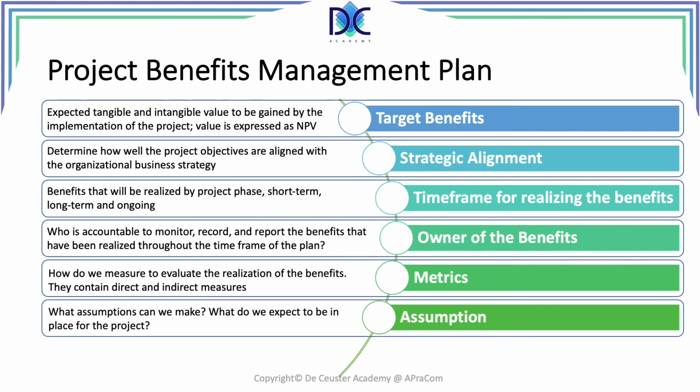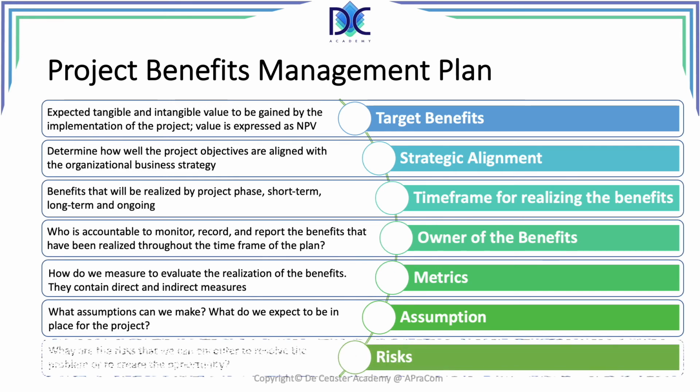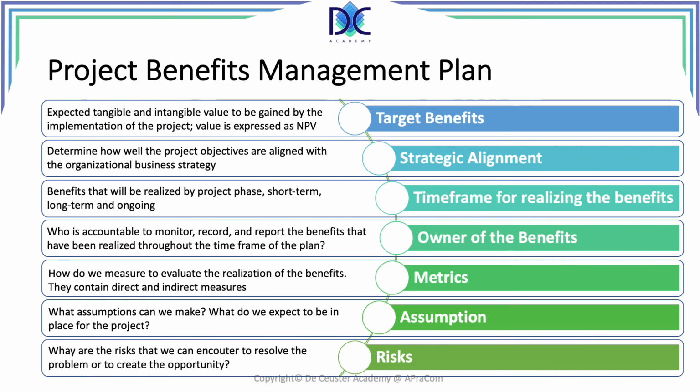What are the assumptions? It's always important to see which assumptions we make, because assumptions are basically elements that can lead to risks. An assumption that is not met means that there is a risk factor emerging. Risks also: what are the possible risks that we can encounter, and how can we resolve or deal with those risks? That's more related to the risk management plan.